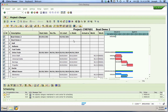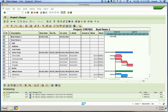Next, we'll move on to scheduled dates. Scheduled dates are the start and finish dates of activities calculated by the system during scheduling — they are the ones calculated when you plan and schedule an activity. For WBS elements, scheduled dates are determined from the scheduled dates of the activities assigned to the WBS element. They can be extrapolated from the lowest level WBS up the WBS hierarchy and used as constraints if required. In network activities, these are called earliest and latest dates, represented in this scale. You can bring them in via field selection — earliest start and latest finish are what your scheduled dates will show.